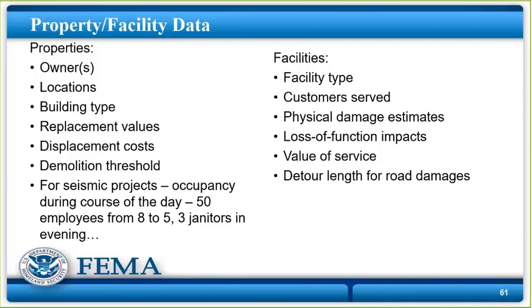If there is one, a lot of tribal properties don't have that, and I recognize that. Replacement cost value can be a toughie, but we have books here at FEMA, and this is one time we can help you with developing your project application. If you need a replacement cost value for a single-family two-story house in Juneau, we can help you with that, because we have books from the National Home Builders Institute that are provided on an annual basis that give us a locality-adjusted dollar per square foot cost.